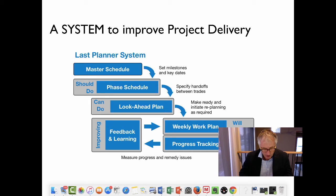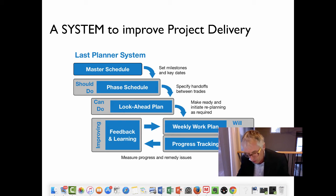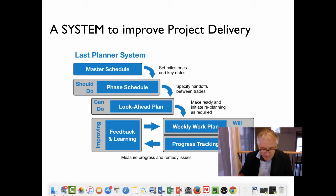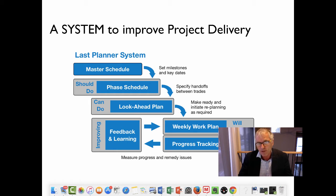The phase plans are pull planned by the trades doing the work. Working backwards from the milestone dates and upstream, trades pull the tasks needed for the completion of the work, establishing commitments and handoff dates for upstream work. This network of tasks and commitments establishes a high-level work plan based upon the available capacity and commitments to complete the work to a collaboratively developed phase plan.